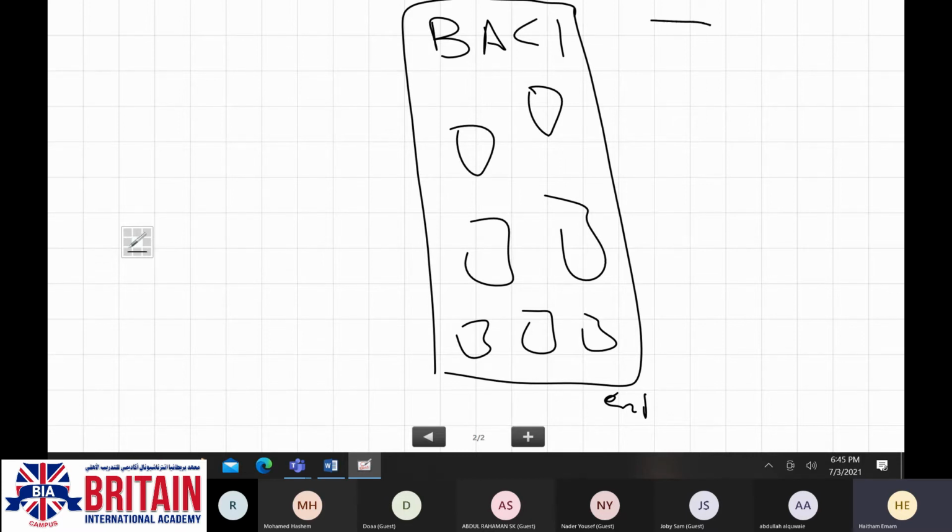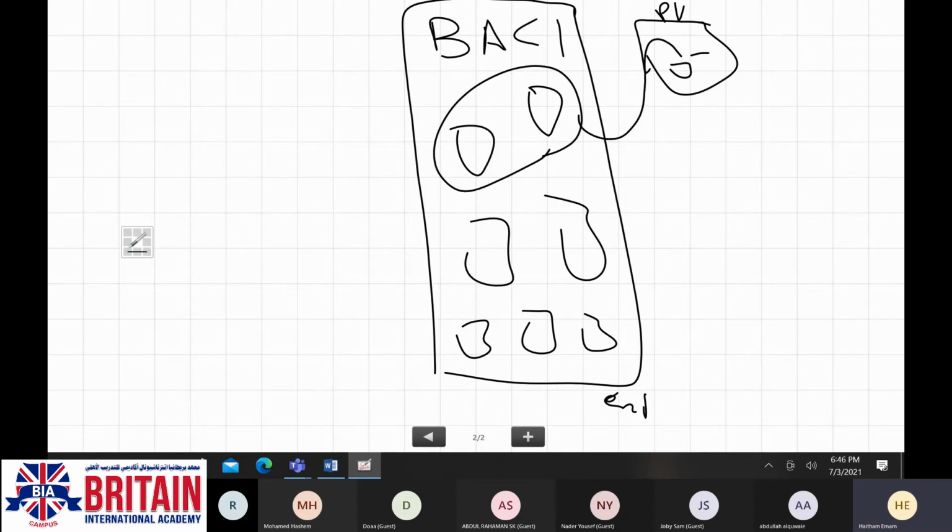Second, we have the planned value. As you said right now, we are going to have a certain delivery. We are planning to do it during a certain period of time. So the estimated cost of this planned delivery, which we haven't started working on yet, is called planned value.